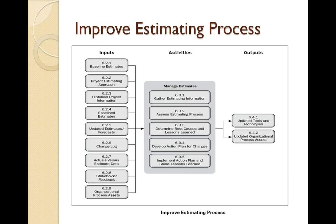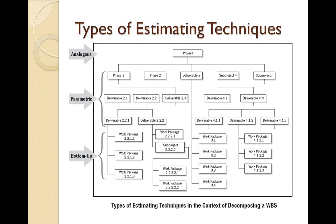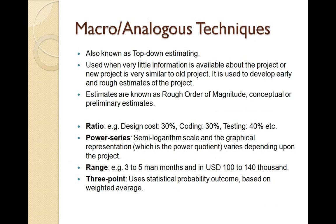Let's look at the categories of estimation techniques — not specific techniques, but their categories. The top-level technique is analogous estimation, a high-level or top-down technique. We also use parametric techniques, which use parametric models, mathematical queries, and calculations. And we use bottom-up estimations, where we detail down to the work package level using a work breakdown structure — covering all project phases, deliverables, individual work packages, and tasks — then roll up the estimates to the top.